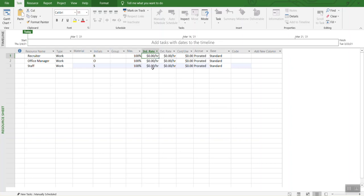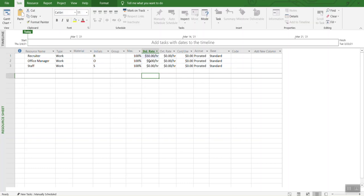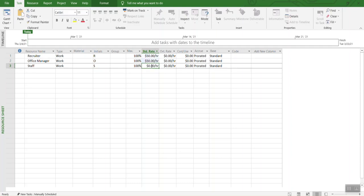Another thing that we are going to do is assign the hourly rate. For example, for recruiter, we say that they get $50 an hour. And then office manager also gets $50 an hour. You can change the numbers in any way you want based on your project.